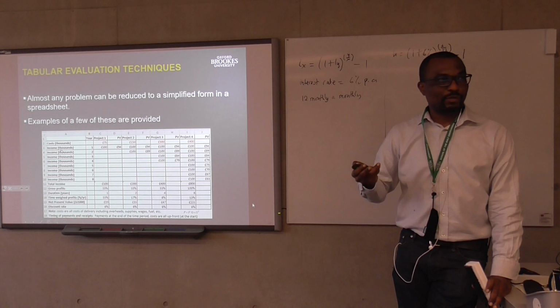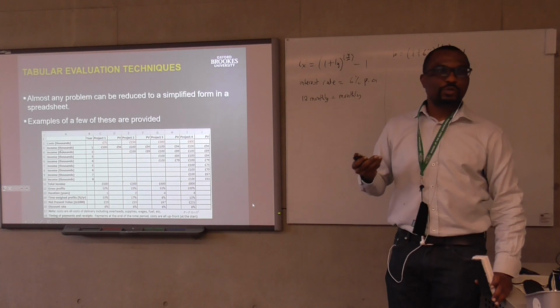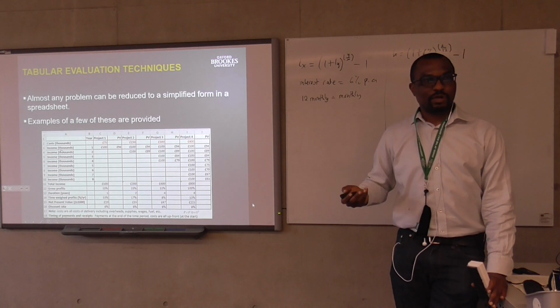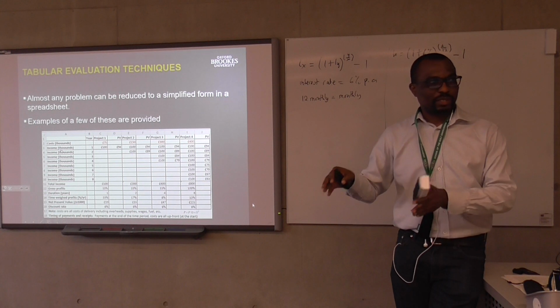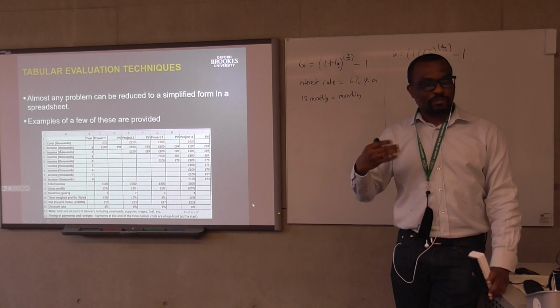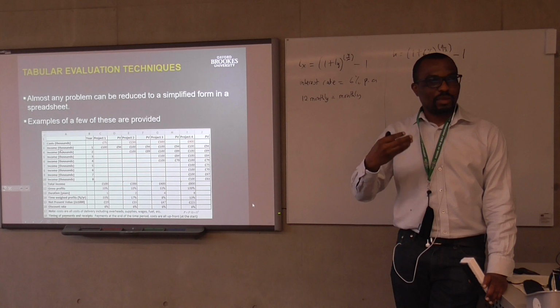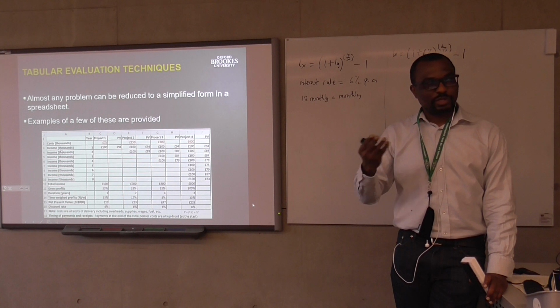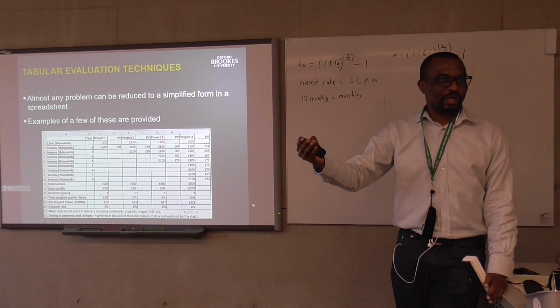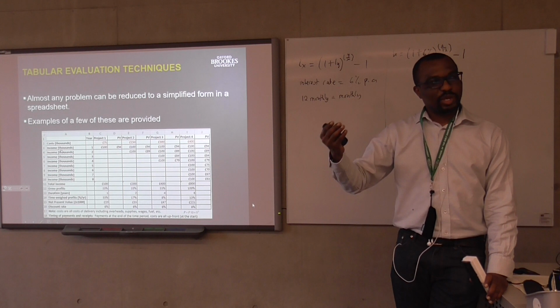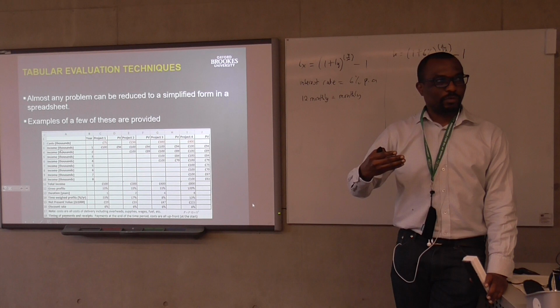The residual valuation method is simply an approach where, if you are a developer, you've not been able to buy the land yet. You've located the land, but maybe you've come up with, okay, I think this is how much the project will cost me. These are my likely sources of revenue over the next 10 years or 15 years. And based on that, this is my net present value, right?